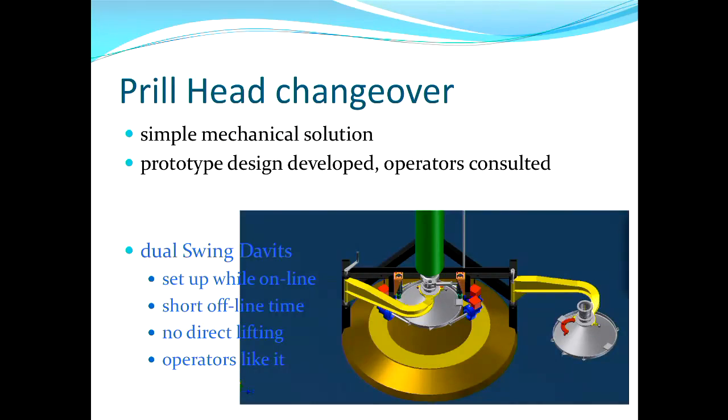And we designed this up, and it needed to be talked through with the operators. There are industrial relations issues related to every aspect of the plant, and the operators needed to be sure that this change to the way they were going about their work was going to be good for them, safe for them, and wasn't going to do anyone out of a job. And anyway, they became enthusiastic about this design, which can be set up while it's online. It's a short offline time, very little, no direct lifting, and the operators were on board.